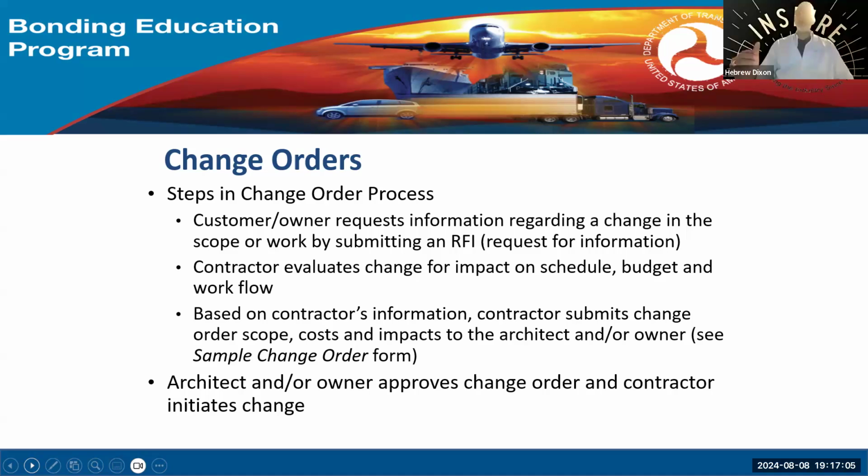And then, as a function of those, remember the things we lifted up for you: always make sure you do your schedules and understand what the schedules are as they relate to the cost of work, because that is a cost to you. Or maybe it's not a cost at all. But maybe if you add them all up, it may be 1 day or 2 days. Maybe it's half a day. But at the end of the day, you may have a liquidated damage clause in your contract, and you documented all the time that you had delay. Maybe it's a two-day delay, but no cost.